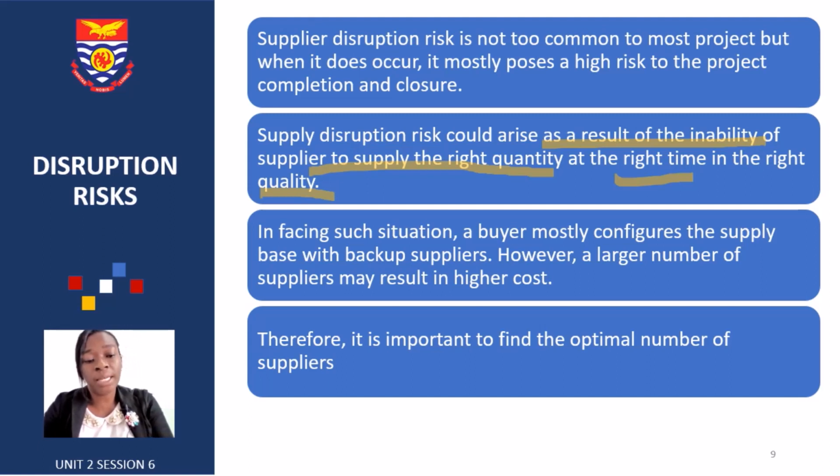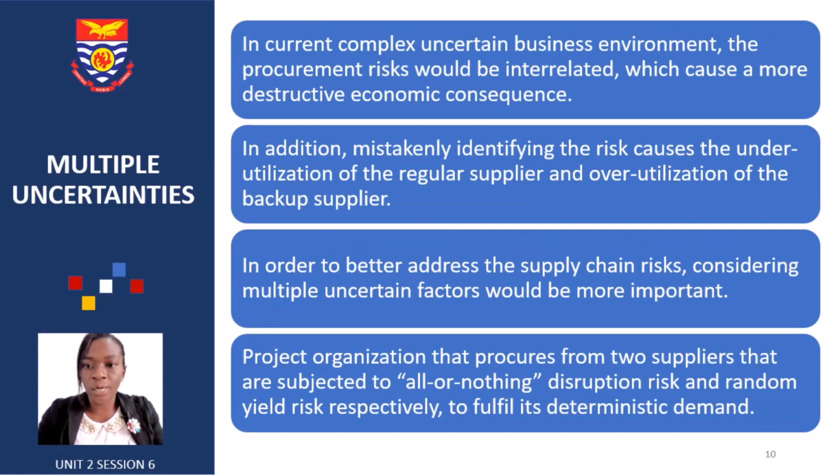So in as much as we've been talking about backup supplies, these backup suppliers also come with their own cost, which can affect the project as well. So it is important for you to find an optimum number of suppliers. Because we're making mention of backup suppliers, it doesn't mean go and get 10 when at the end of the day 10 may be too much cost. It may eat up all the money or the funds available to the project. So you need to get that optimal balance of suppliers who would work for you as well.